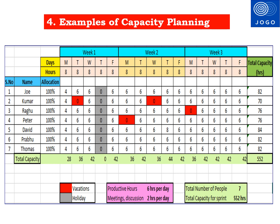Vacations taken by team members are highlighted in red. A total of 4 vacation days are planned by the team in this example, with 0 hours considered for those days. The first Thursday is a holiday for all team members, shown with grey highlights in the first week, with 0 work hours for that day. Out of 8 hours per day, 6 hours are considered for actual work and 2 hours are planned for meetings and discussions. On the first day of the sprint, the team spends 4 hours for sprint planning, so capacity is 4 hours per person that day.